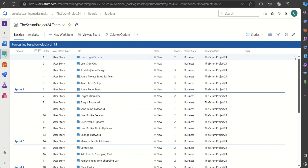This is how we can use the forecasting feature based on velocity. The number to enter comes from two scenarios: if we know the team velocity, we enter the actual velocity; if we are planning new work we start with a planned velocity. Once we've done three sprints and know exactly what the team's velocity is, we can enter that number to predict the upcoming number of sprints for the remaining work.